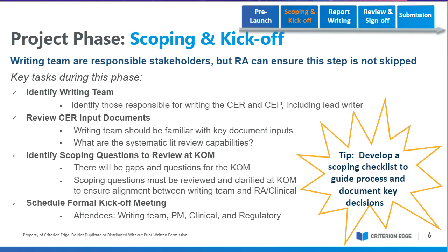And then have a formal kickoff and consider inviting the writer or the writing team, project management, clinical, regulatory. And here at Criterion Edge, we have a scoping checklist that we actually use that collects answers and decisions that we use at the kickoff meeting. So that's a great tip if you should want to develop that. Okay, next question. Next slide.